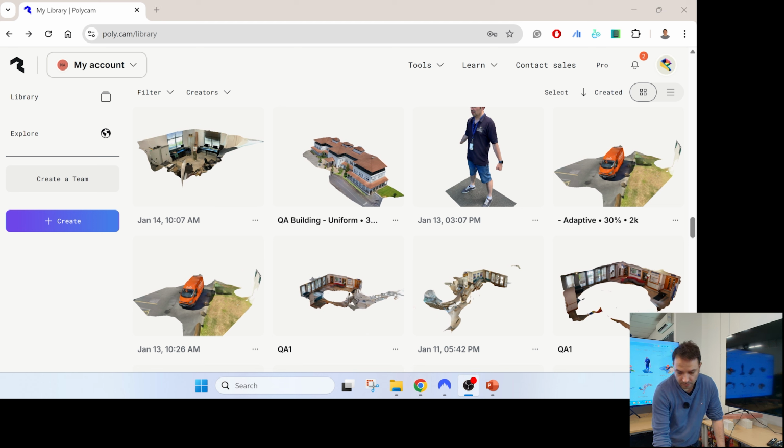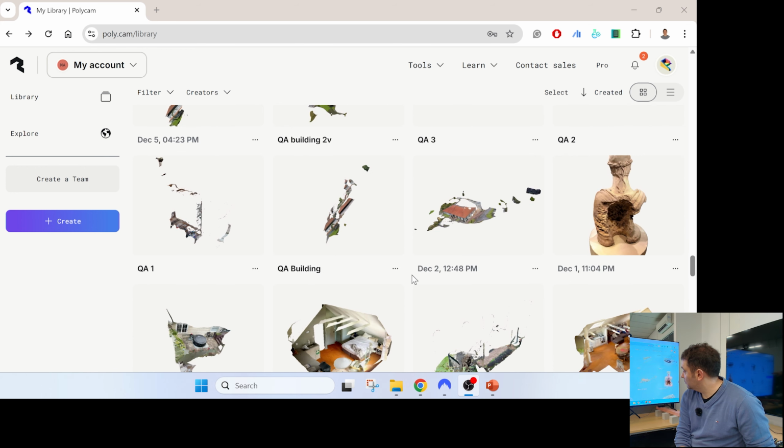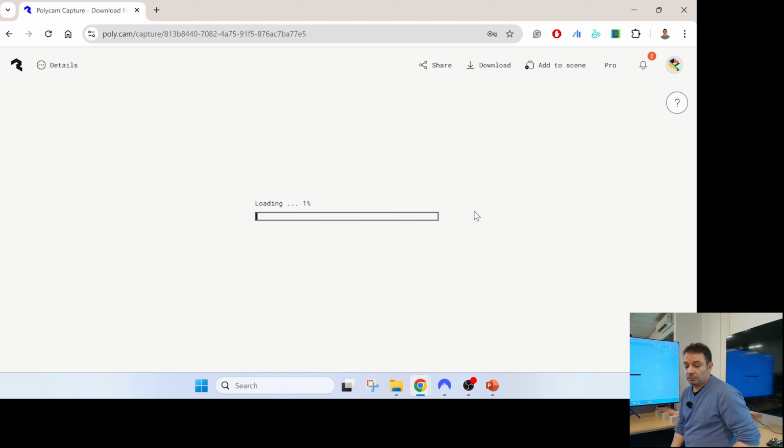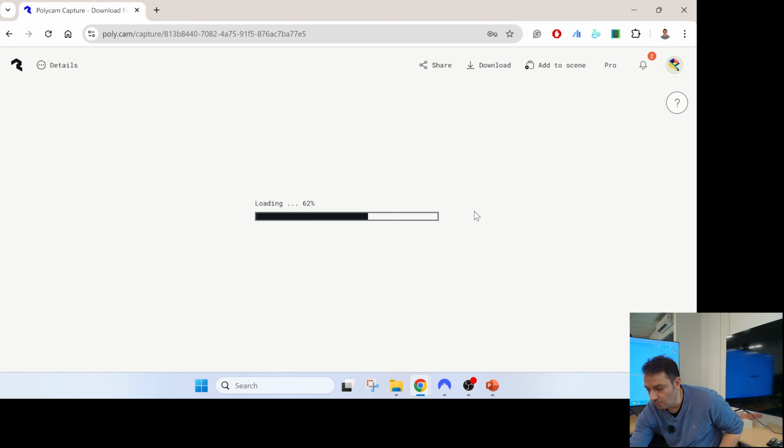And guys, when Marino is busy with this kind of stuff, also think about when you do your progress reports to the client. You can do a 3D scan of the construction site. If you've got the technology, it's a quick one. You do it in the morning and you put it in your progress report. And when you present to the client or to the stakeholders, you can use a nice 3D model to illustrate to them how far along you are in the construction process. So it's just making it more exciting for people to look at.